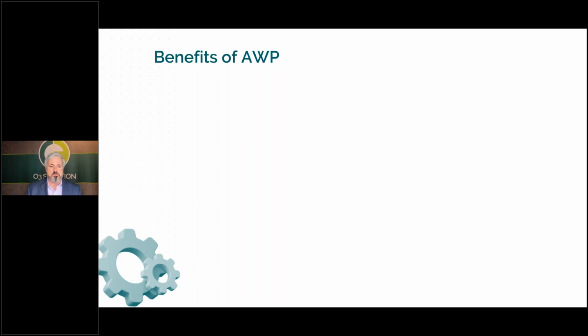But one of the challenges that we find is that when you lead with that, it can be misleading, because people either don't achieve those levels of AWP productivity increase when they're early in their journey. So they're immature from an AWP perspective. When it's your first projects, you typically don't see that level of productivity gain. And then the other issue is, what are you measuring that productivity gain against? If you're looking at past projects, or you're looking at estimated versus actuals, the challenge there is that in a lot of cases, some of that value has already been baked into the estimates and the way that the project was proposed. So you can sometimes not capture all of that or not see some of that value.